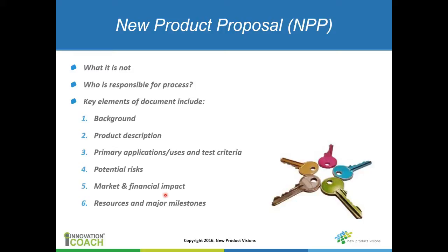It's very appropriate here to do a basic financial model where you're looking at volumes and what the cost structure needs to be, and margin requirements, and net present value calculations, and so on and so forth. So it's very important to do that type of work as part of this document.